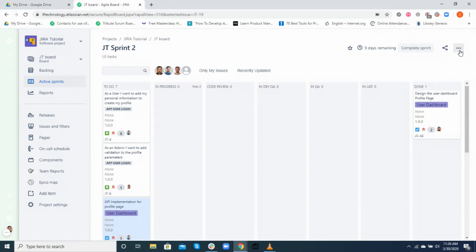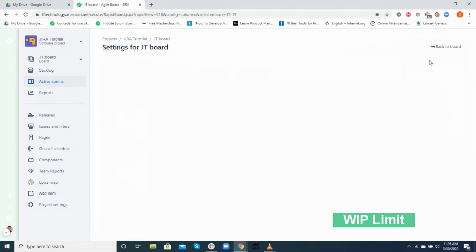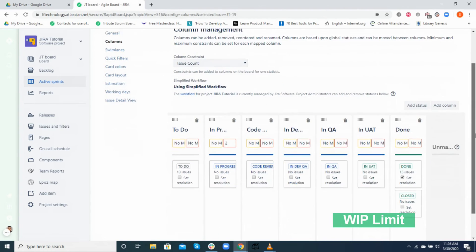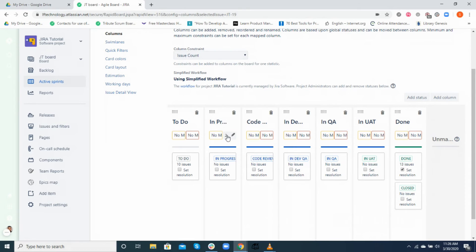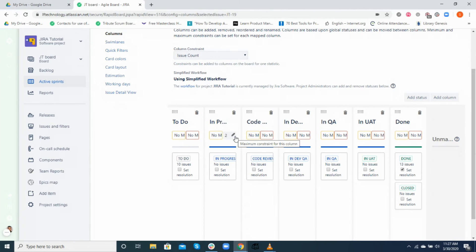Let's briefly go over WIP limit, or work in progress limit. WIP limit is a lean way of limiting the workflow. It restricts the maximum amount of work items in various stages of the workflow. Well, this allows you to complete single work items faster by helping your team to focus on the current tasks. This is usually practiced on the Kanban process, however Jira also allows you to add in WIP limits in active sprints.